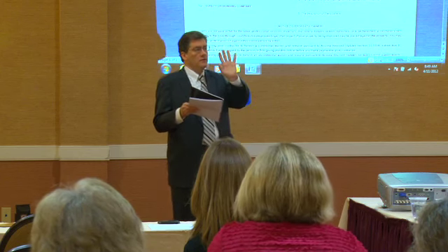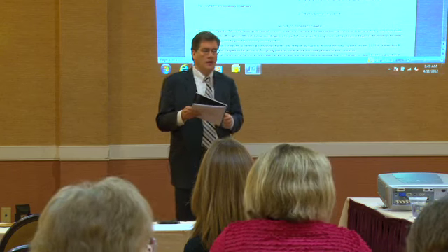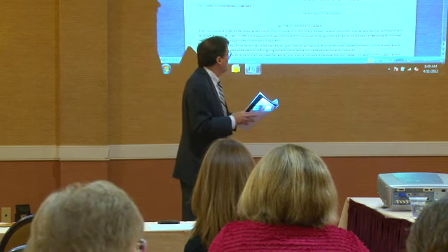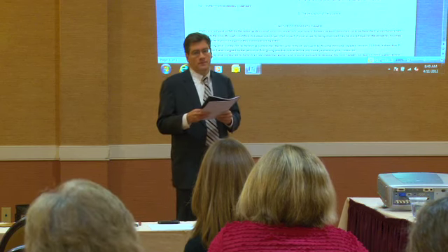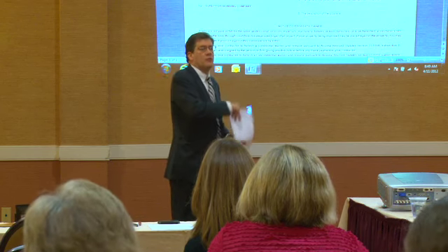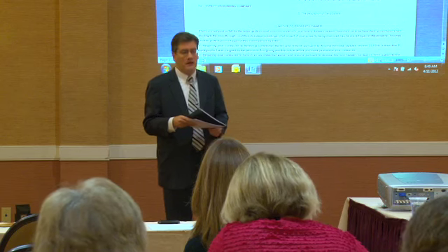But on that amended preliminary notice, we do not put in $40,000. If we send out an amended preliminary notice, we put $60,000 in. $60,000. We capture the entire amount of supplies to date.